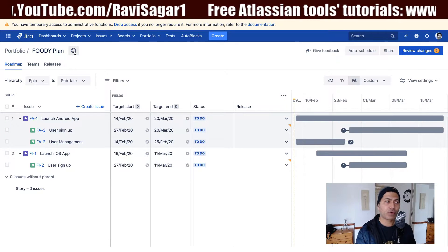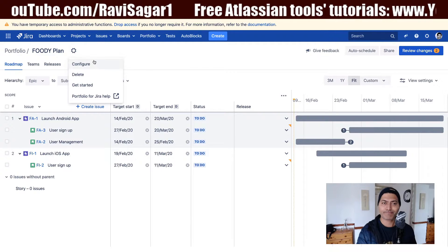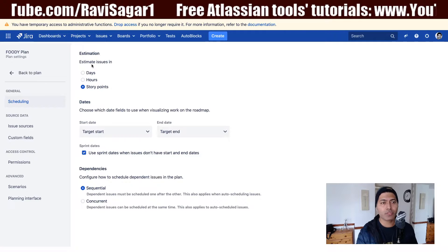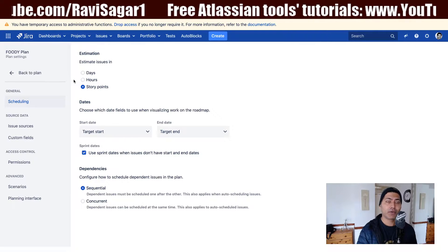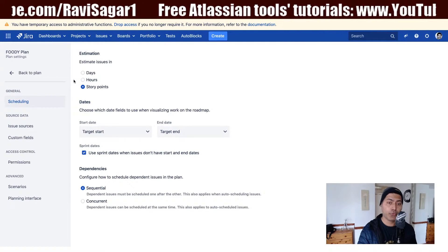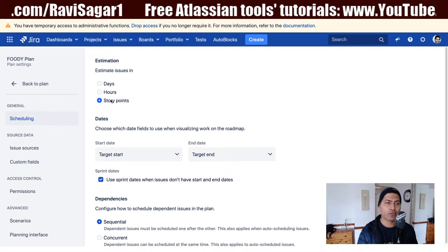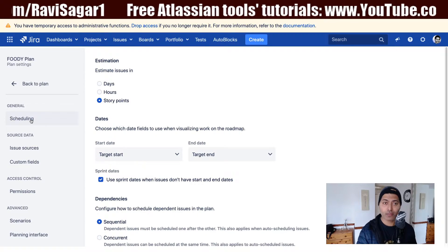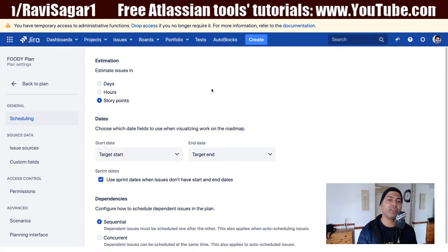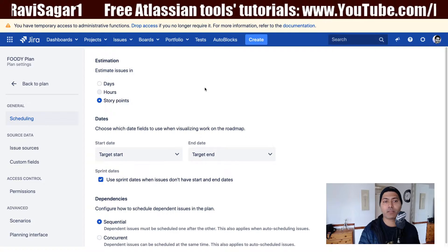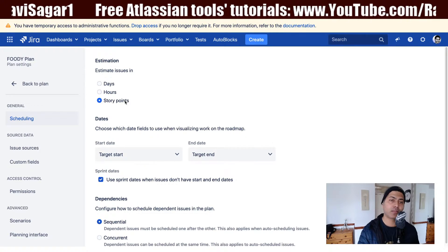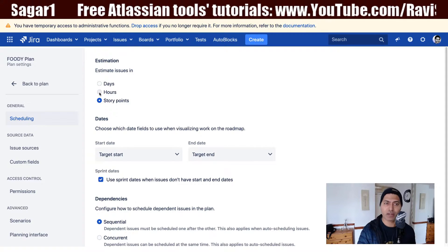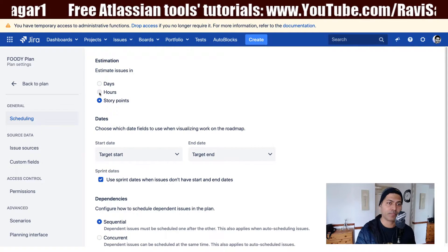When you are working on your portfolio plan, you can go to the plan configure option. Once you do this, you will be taken to the configurations that are applicable to your specific plan. On the left-hand side, you have scheduling. Under the scheduling option, you have the option to change the estimation — for example, if you don't want to use story points, maybe you want to use number of days or number of hours. You can do that from this section.